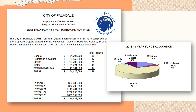But once a decision is made to go forward with the project, it is necessary to secure more substantial funding to cover larger expenses like design and architecture fees, site acquisition costs, and construction costs. As you can see from these two graphics, the city of Palmdale has 216 proposed projects divided into five categories, and the majority of these projects are streets — 68% of the funds are allocated for street projects.